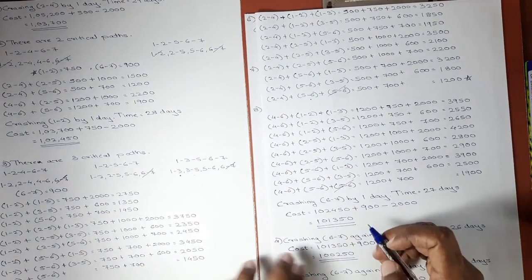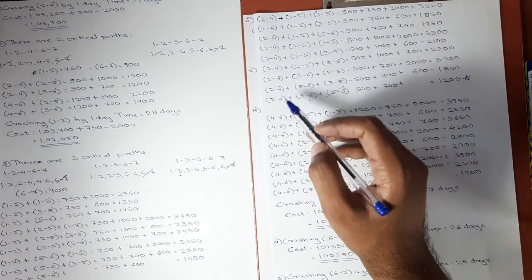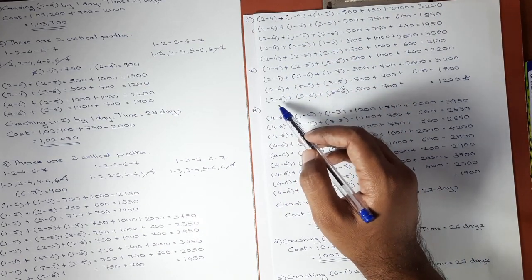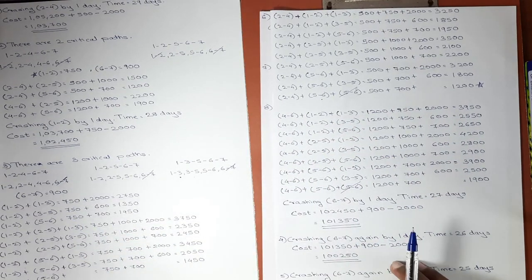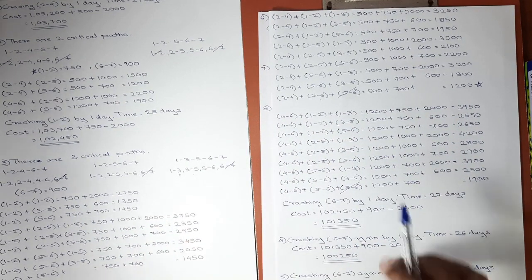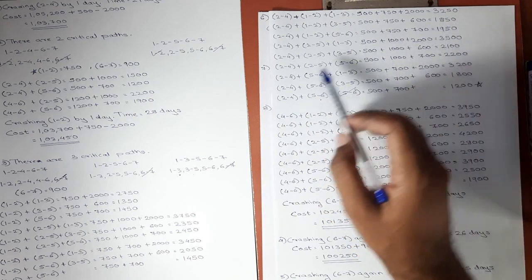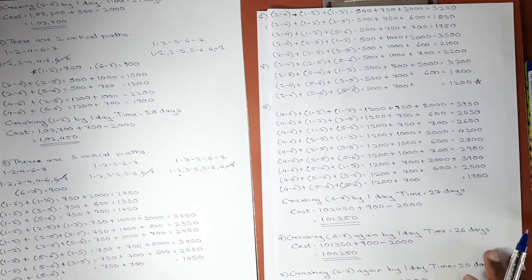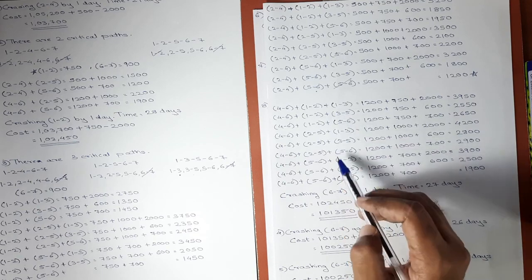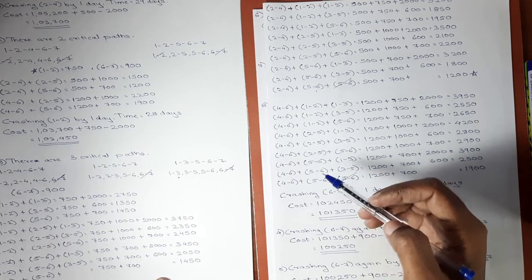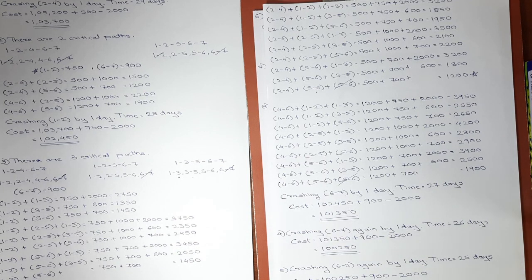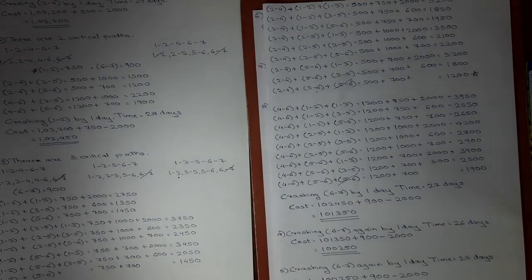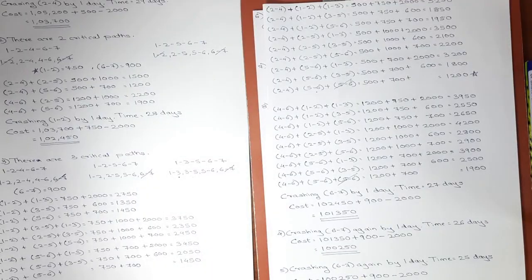Okay, 2 4 is not to be considered now, which is out of the picture. Okay, 6 7 is already out of the picture. Now again these combinations will be out of the picture. Second set will be out of the picture. Now from third set and first set, which combination is having the least cost slope, we'll see that.